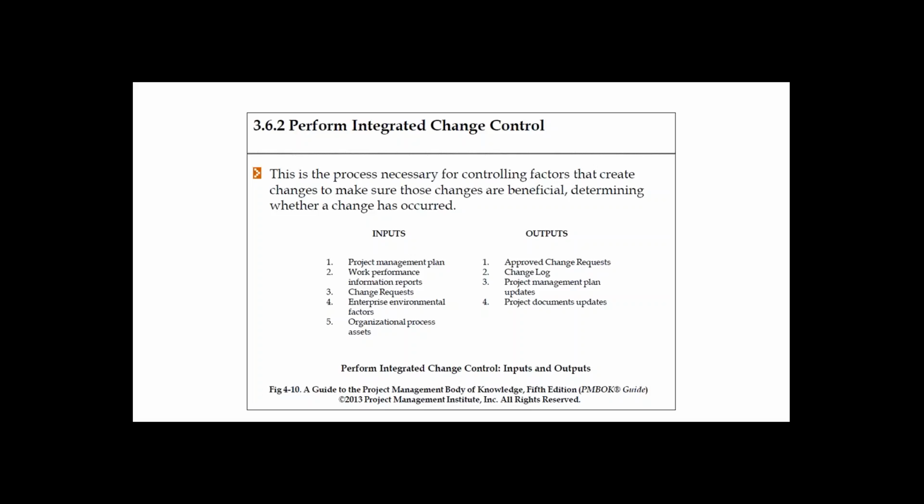So you need to push back on those changes and tell them that this is not satisfying our business needs or the objectives. Yes, it is useful. Maybe push it to some other project, but not in my project. So you have every right to push it back. And if you feel, based on the first hand information, that this requires a change request, then you need to follow the process.